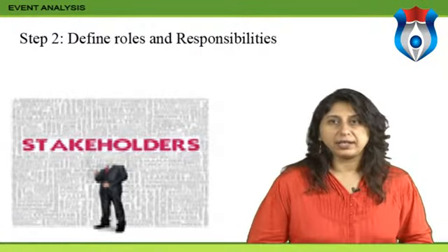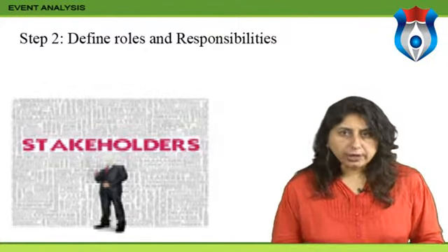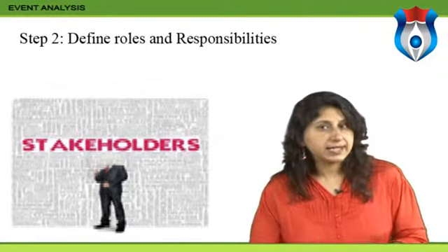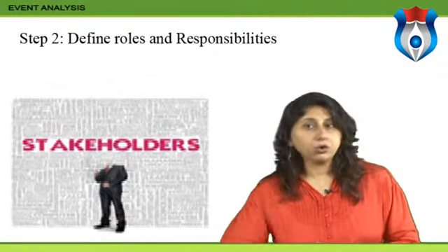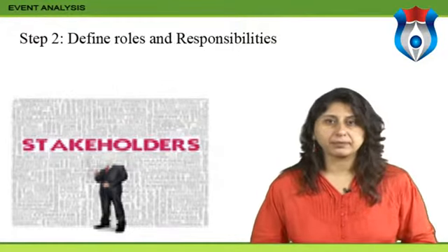Step 2: Define roles and responsibilities. Not all key stakeholders will review all documents, so it is necessary to determine who on the project needs to approve which parts of the plan.